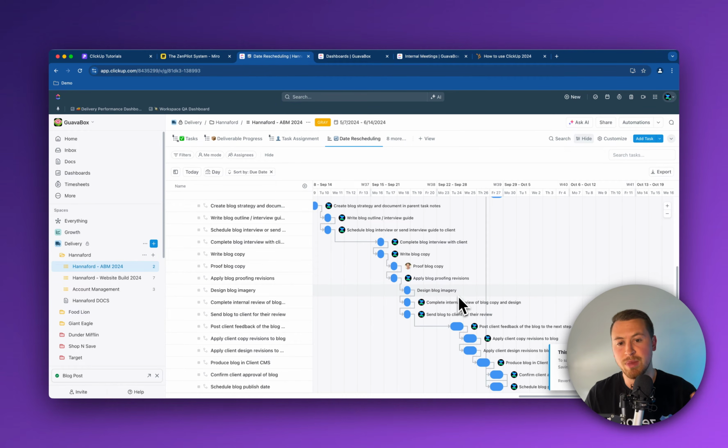And so I tell you to make sure that your team, as they're working, if they don't get a task complete, talk to the project manager of that project, because this Gantt view is the best place to do it. Because if someone is just taking their task and updating the due date, that's not necessarily going to make any of this work flow together. There's not a great way. You can turn on a ClickUp, but that ClickUp is not all that effective in terms of remapping these due dates based off of those dependencies. I highly recommend you have the project manager always adjust the timeline in the Gantt view to make sure all of this work stays compact.